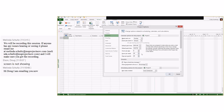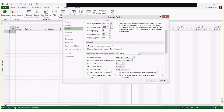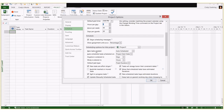You want to change those calendar options if your standard calendar reflects anything different. Right now Project thinks one day's duration equals eight hours. If you have a project calendar with only six working hours a day, assign a resource to a one-day task and Project thinks it needs eight hours — so your duration shows up as something like 1.25 days, giving you fractions that don't make sense. If you use a different calendar, make sure you adjust your calendar options.